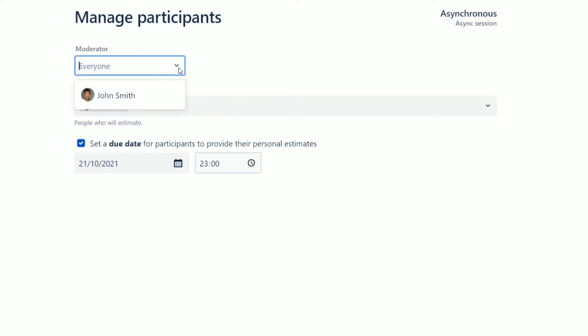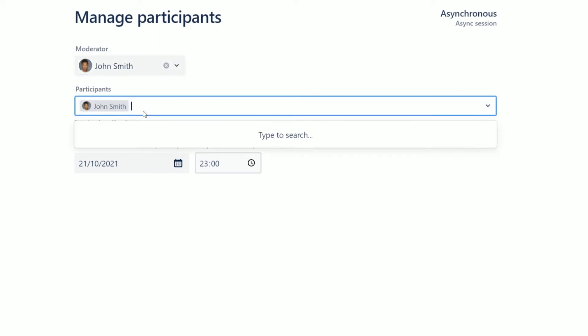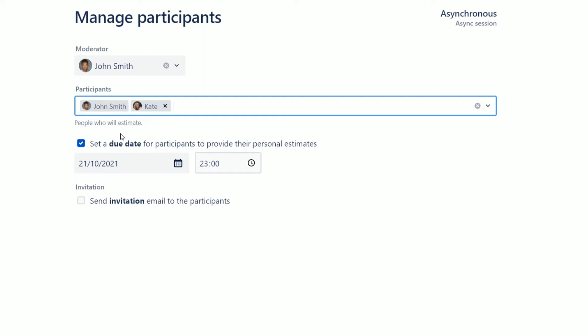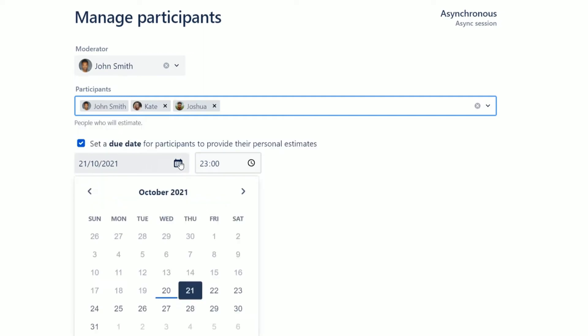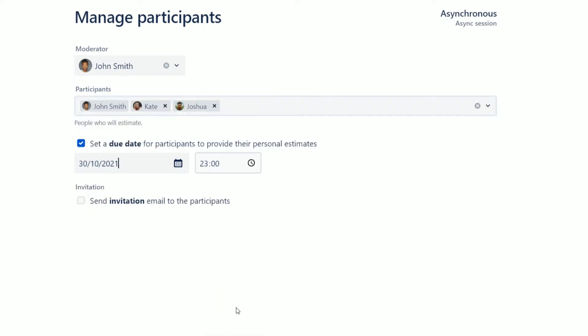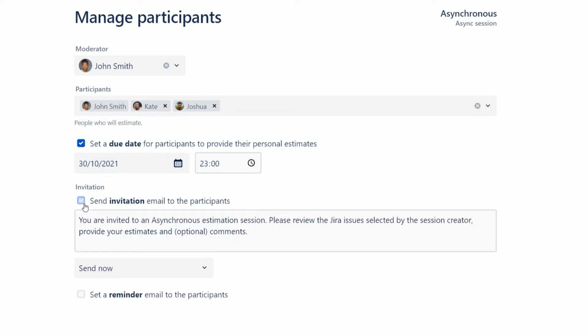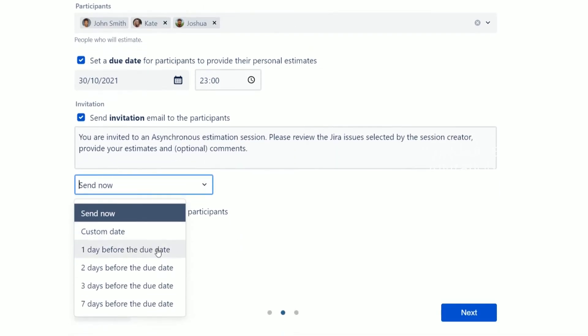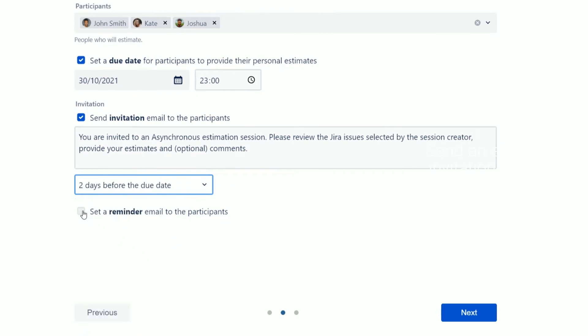Assign the session moderator who will review the personal votes. Then add session participants and define the due date for providing their personal estimates. You can send an email invitation and additional reminder to notify session participants to provide their individual estimates on time.